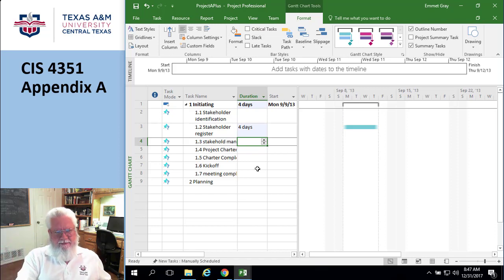Okay, now one more time. So what's the point of baseline? Well, if I say it's going to take 6 weeks to do and you do it in 4 weeks, well, I have to have both the original estimate, the baseline, and the actual data. Otherwise, I can't just have what the actual data is. I need both, right? I need to have what the original schedule was and what the actual is, and maybe you're ahead of schedule, maybe you're behind. Either way, I still have to have both sets of data. Well, right now I don't want to have both sets of data because I'm in the midst of making my guy. Okay, whew. All right.